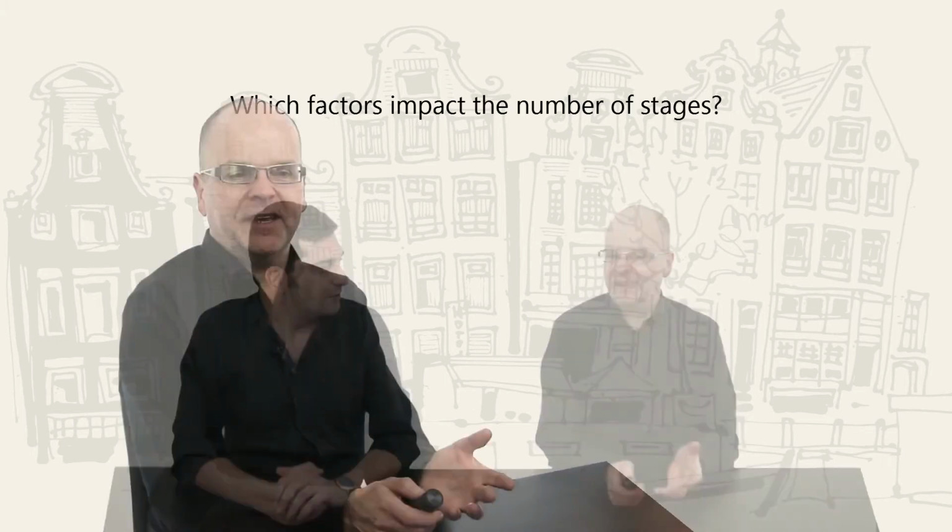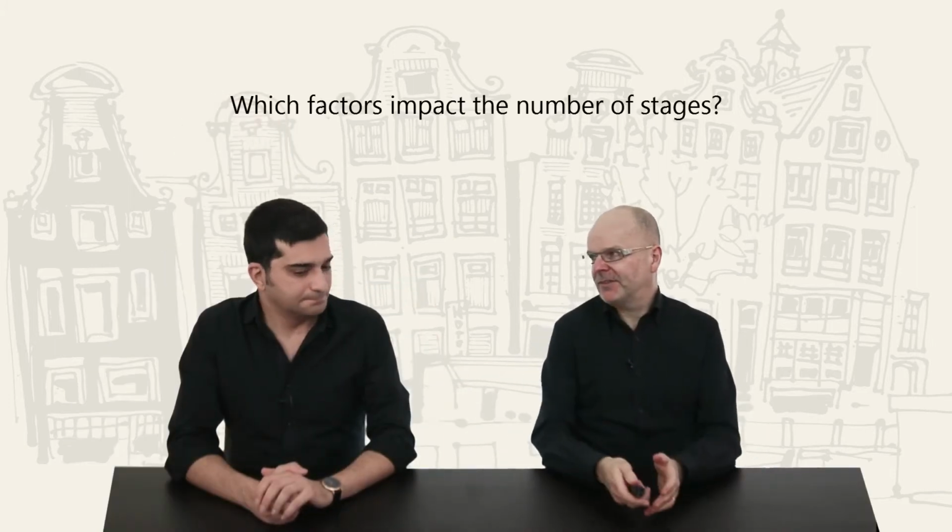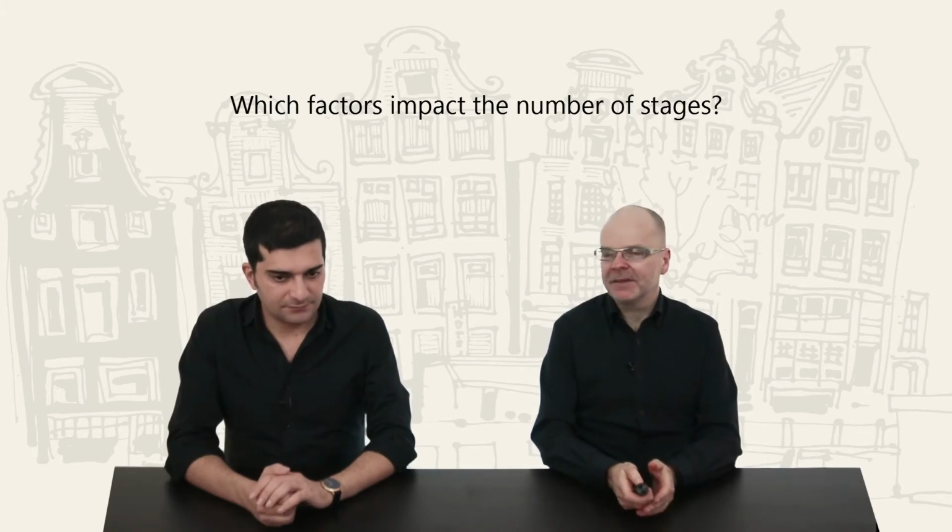I think I've read once that if the project board are working with a new project manager, at the beginning they probably might keep the first two stages short, but after that the trust is there and then they allow them to have wider stages. I think that's a good example, let's say.